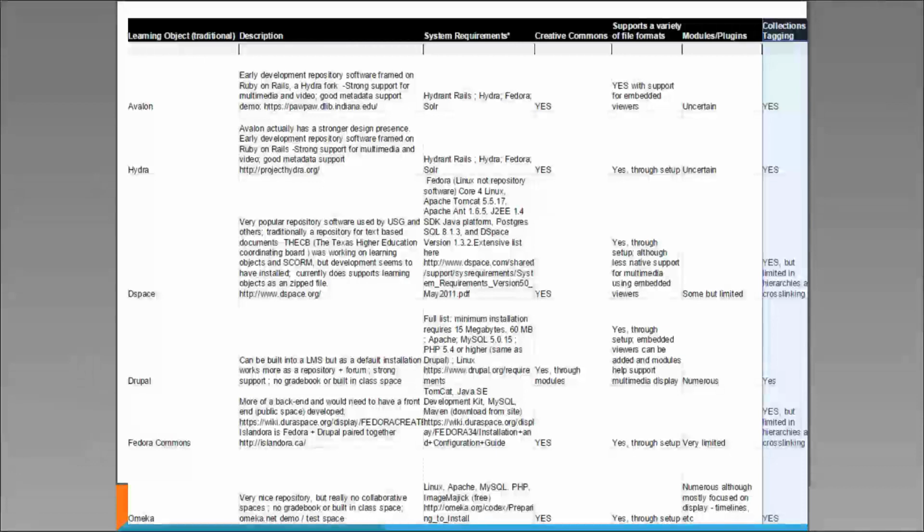We had quite a depth of MySQL and PHP expertise, and then some HTML, CSS expertise overall, in addition to some other things like SAS and other data sorts of stuff. So we had a lot of expertise, but we did not really have a strong community of Ruby on Rails developers, either in the student population or in the faculty and staff population. So although Avalon is open source, at the time it felt like we were not going to have the resources to be able to participate in that project, or to be able to successfully undertake it.